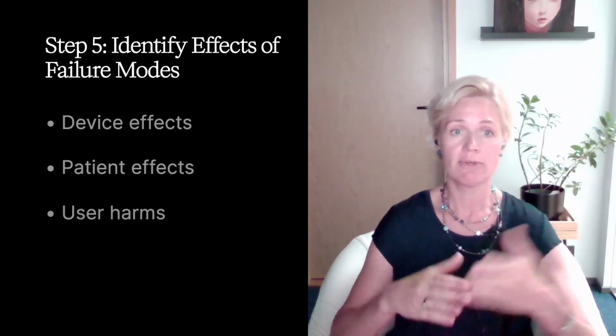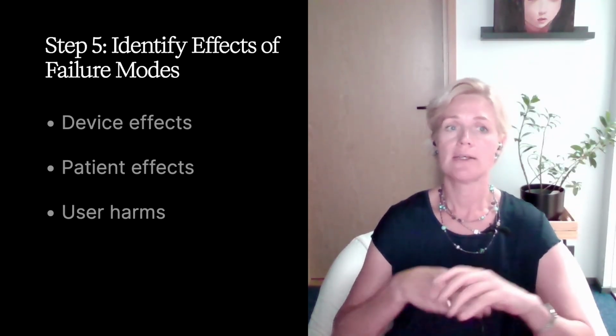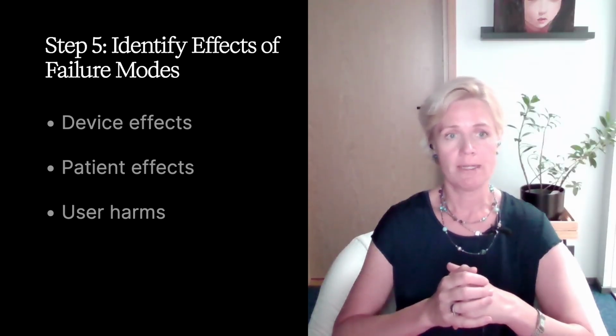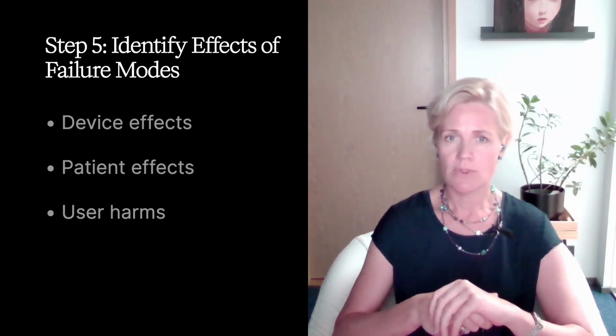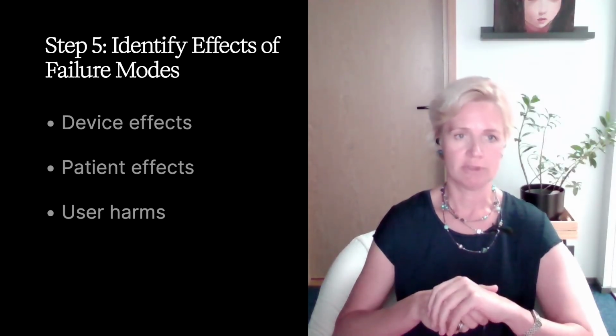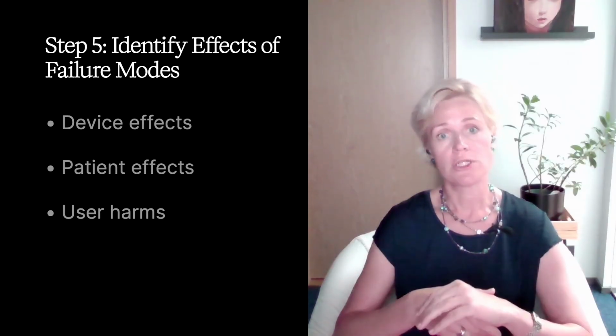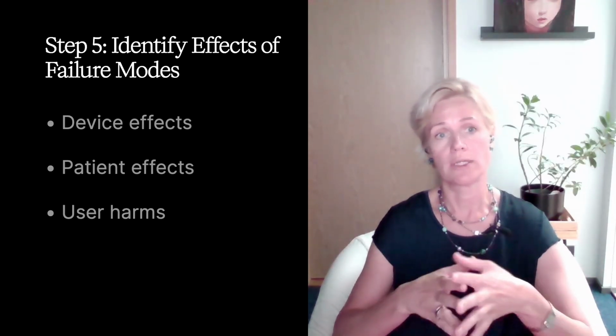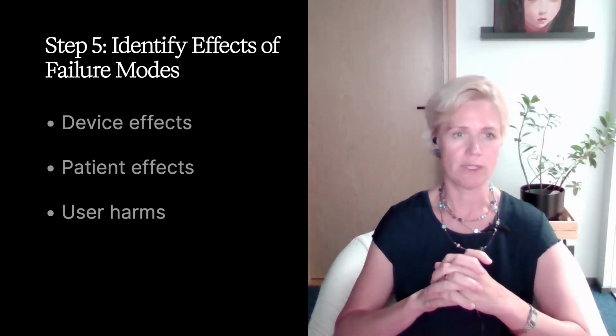Step 5, identify the effects of each failure mode on the device, on the patient, on the user, or the environment. Evaluate both local effects within the device and broader system-level effects. Identify possible patient or user harms, and also ensure that clinical perspective is applied while doing so.